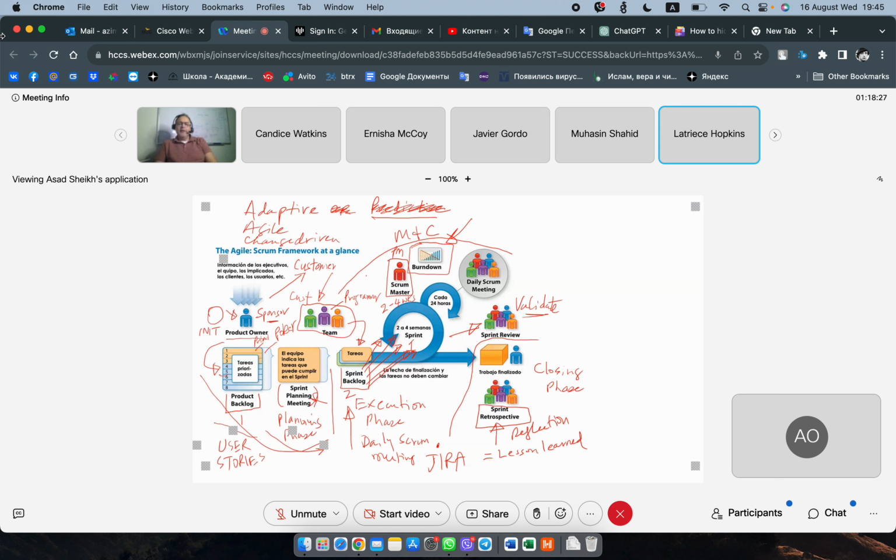Okay, very good question. Let's say you are building a website, and that's your project, and in the planning phase, you looked at your backlog, and the backlog has 50 things. You are working with the product owner, and you say, if you do 5 every sprint, then 50 divided by 5 is 10 sprints. We have to do 10 sprints before we can close this project.